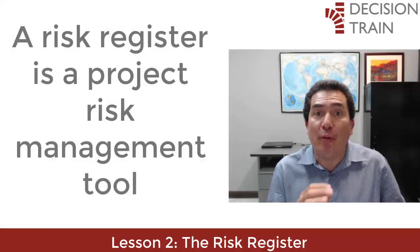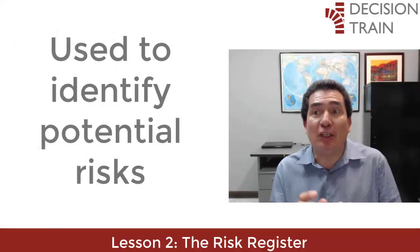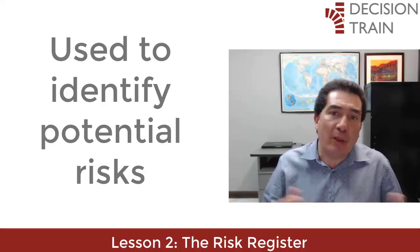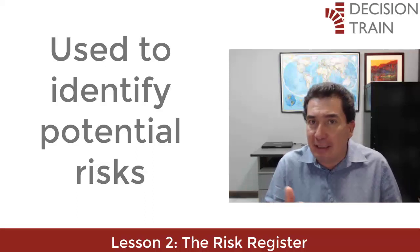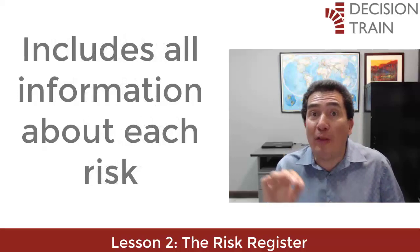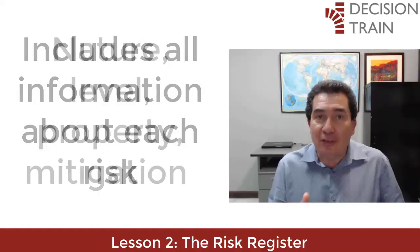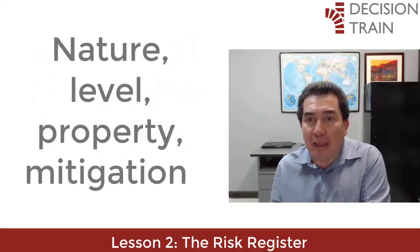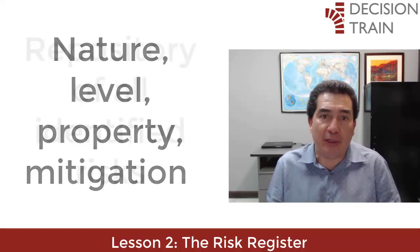A risk register is a project risk management tool. It is used to identify potential risks in a project or an organization — sometimes to comply with regulations, but mainly to be aware of potential problems that can derail expected results. The risk register includes all the information about each identified risk, such as the nature of that risk, the level, to whom it belongs, and what mitigation measures are established to respond to it.